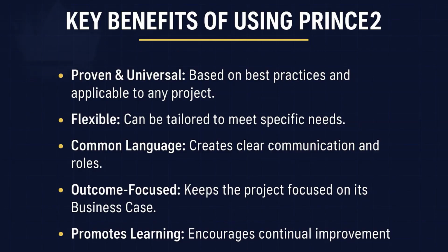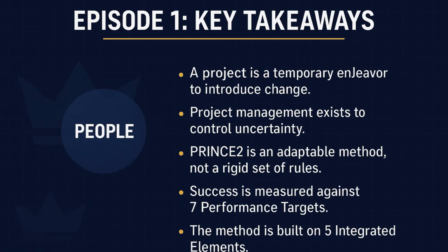Okay, so the big picture is managed sequentially, but the products themselves. The actual development of each of the 3 cybersecurity products is done using an iterative incremental approach. They probably have agile teams building features, testing, getting feedback, aiming for minimum viable products, MVPs, for each one. So PRINCE2 manages the whole transformation, including the interfaces between the products, the market launch sequence. Exactly. The plan described shows this layering. It mentions stages moving from initiation and high-level design, then through iterative development cycles within stages, then soft launches, maybe beta releases, culminating in full market launches and handover to the BAU support teams.